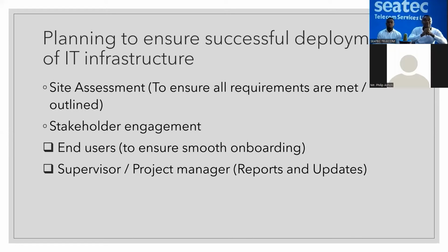The next group is supervisors and project managers. Some clients prefer there's one person that moderates and coordinates the project. They employ maybe a consultant or a project manager who supervises the work, who coordinates all service providers and the projects in general. It's important to engage this person, know the person's management style, know how the person wants to be updated, know how the person wants to be reported to. It's important to know because these people coordinate, and to have a smooth deployment, there needs to be a good handshake between you, the clients, and other contractors.